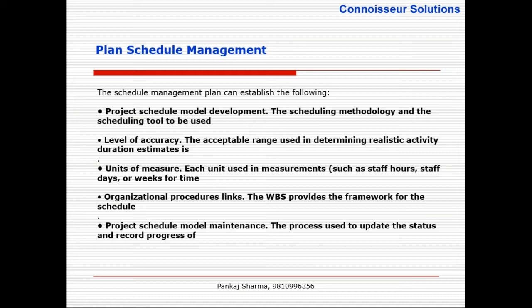See, the only way is, and this is my request to everyone who is dealing in projects: do not commit resources based on high level requirements. You should clearly see that high level estimates based on high level requirements can only give you a roadmap, some idea about the business viability. Any kind of commitment on resources and dates should be made based on detailed planning, which should be done later. So try to influence your customer. Give him an idea that whatever estimates you are telling right now may vary by plus or minus 25%. Give them the reason for it. Try to convince, try to influence the customer. That is the only way.